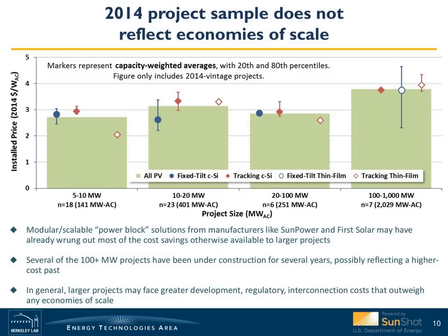To be fair though, some of these larger projects have been in construction for multiple years and as said earlier, maybe more expensive because of that. In general though, some of these very large projects may just face greater development hurdles or regulatory scrutiny or higher interconnection costs that may outweigh any kinds of economies of scale.